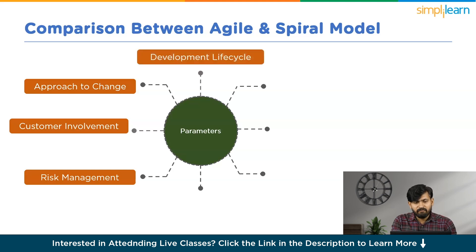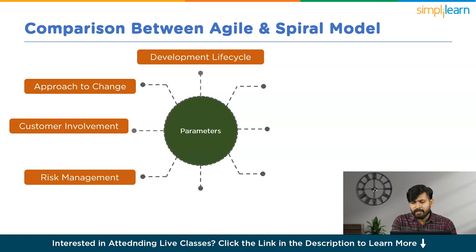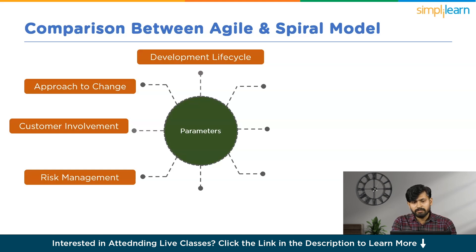The next parameter is the Development Lifecycle. The Agile model is characterized by short, time-boxed iterations or sprints, each involving planning, execution, testing and delivery of a specific set of features. The development cycle is continuous and iterative, with the product evolving incrementally in response to feedback. This lifecycle suits projects where requirements may change frequently and delivering a minimum viable product quickly is essential. The Spiral model's development lifecycle consists of multiple iterations or spirals, each encompassing planning, risk analysis, engineering, testing and evaluation. The project begins with identification of objectives and alternatives, followed by development of a prototype. Subsequent spirals build upon previous ones, incorporating feedback and addressing risk — particularly effective for large, complex projects where systematic risk analysis is crucial.